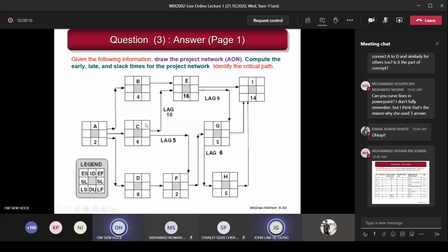Yeah. Okay. So meaning I finish C, let's say this is, I put there, is it days? Okay, let's say it's 10 working days. I finish activity C, 10 days later I start E. You understand the meaning? Yes. That means after the activity C is finished, then it will delay for 10 days before starting the activity E, right? Yes, that's the meaning.